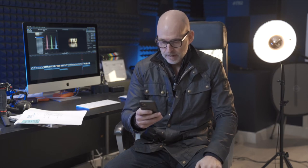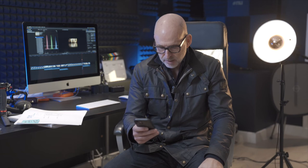So great tactical location. And then we've got Beaufort Street in Chelsea. The keys are meant to be dropped off this week, and we can start in March. So this is the 1500 square foot apartment, lower ground and ground. We're doing extension and full refurb, only up to second fix items, the client's supplying. That scope of works hasn't been sent over yet, so we haven't priced the second fix up yet.